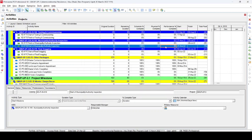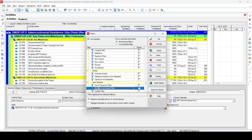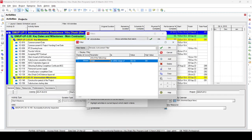Now our baseline is assigned to the project. Next, we are going to create a filter. It is better to create a 'Periodic Achievement Filter' once and reuse it every week, rather than recreating it each time. Looking at the contents of this filter, the condition is: finish date is within the range of data date minus the period. For a weekly report, this is 7 days. For a bi-weekly report, it would be 14 days, and for a monthly report it would be 30 days.